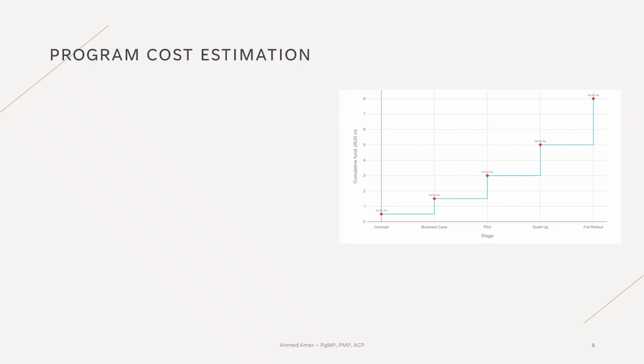At every governance milestone, leadership reviews progress, agrees on the financial management plan, and commits funding only for the next stage. This approach helps organizations stay flexible, manage risk, and make sure the program continues to align with the strategic priorities before investing further. This funding method is better because it doesn't force the company to pay all the money upfront for programs that last years, which would tie up cash we could use for other important things.